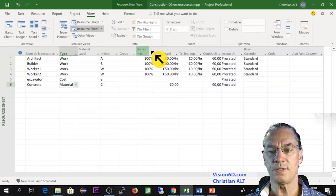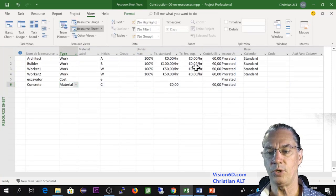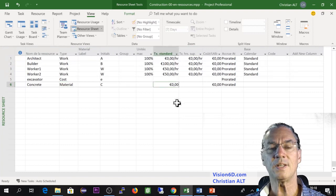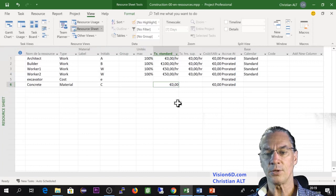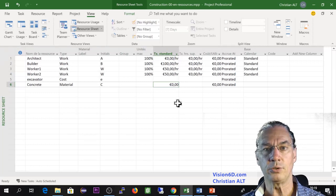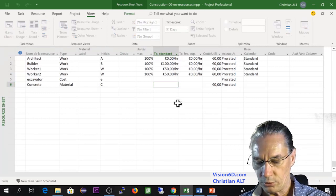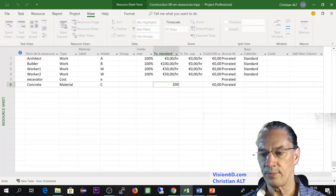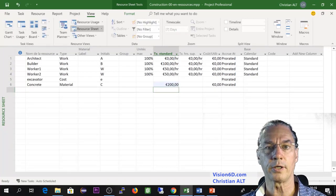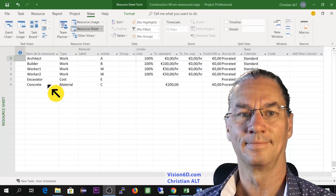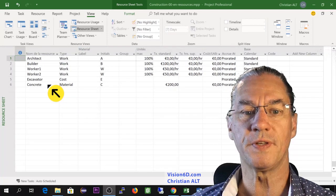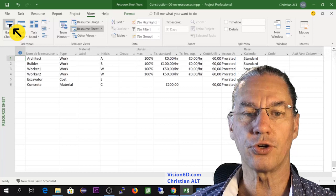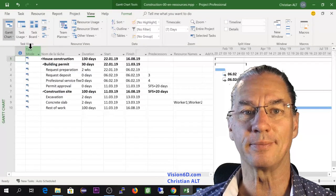And you notice that the unit has disappeared, overtime has disappeared. And there is here a price per unit. So the price per unit that I'm going to give here is about 200 euros for concrete delivered by truck on site. Now that I have defined those resources, we are going to the Gantt chart to see how to use them.